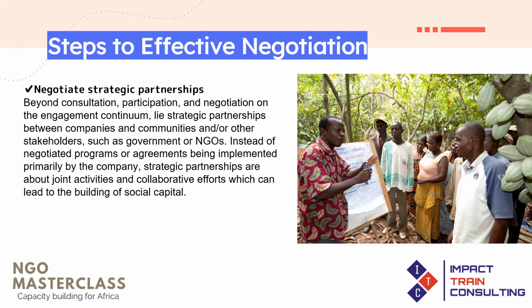Good afternoon, everyone. I just want to share experience in light of the 5th point that was raised that says negotiate to create strategic partnership. I work in the field of literacy with public schools across the country. We found out that we needed SUBEB to help us run this project. One thing that we did was, from the word go, even during the project design, we engaged with SUBEB and with UBEC in Abuja. And this project has run for about 6 years now, and for each stage, we've never had issues.